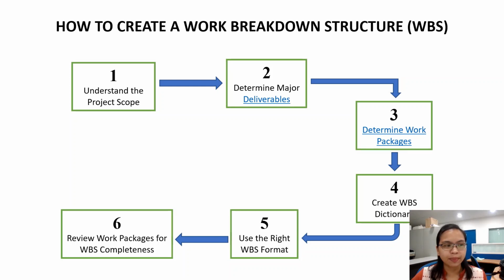This final step is to ensure that the correct numbering is applied to each level and each requirement is efficiently drilled down to all the intermediate WBS. Each component within each level of a WBS is logically connected. Last, it is important to review the WBS components from top to bottom to ensure that each level is clearly listed and no level is missed in the process.